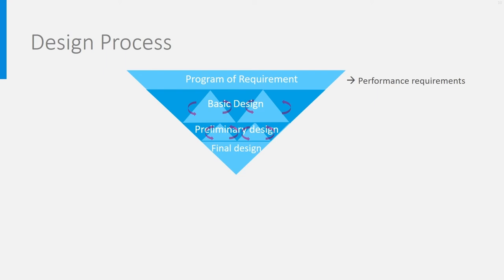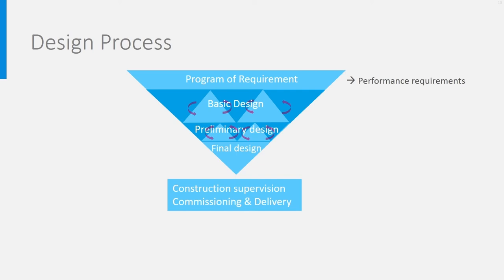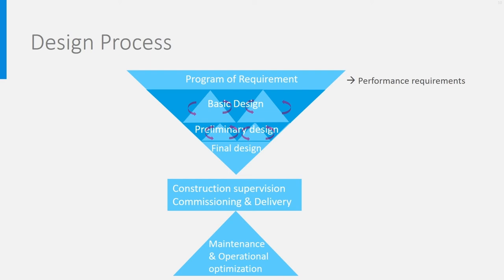Finally, after a choice has been made, the fourth phase comes in, where the complete design is worked out into the smallest details involving a large team. After that there may be a tendering or awarding phase and the contractor will start building. HVAC engineers may play a role in supervising the HVAC construction and ensuring all delivery procedures and checks are done — checks about compliance of insulation, boiler temperatures, heat and cold delivery in rooms, quality of ventilation, etc. This is a phase of tuning of the equipment. During the operation phase, which covers many tens of years, HVAC engineers take care of maintenance, data analysis from the building energy management system, and optimization of operation. There are nowadays many developments in automated continuous optimization.